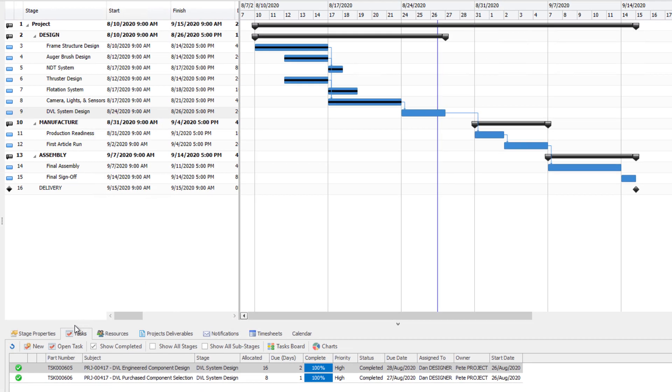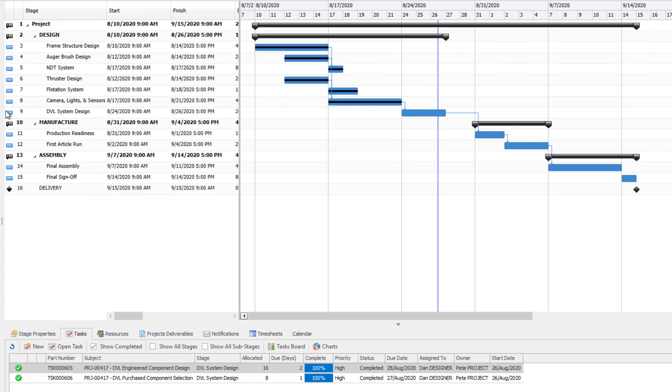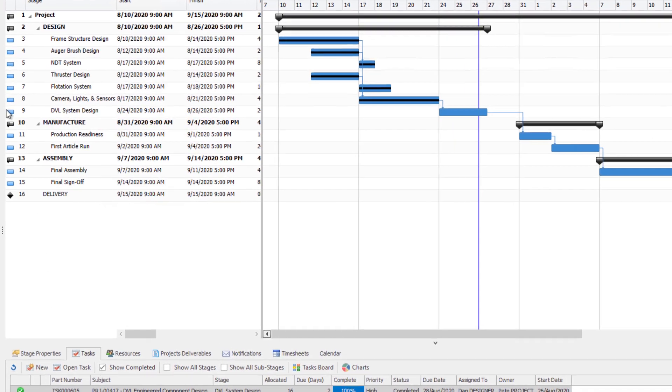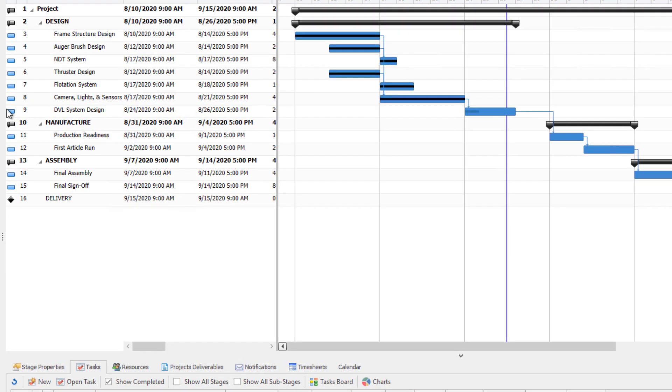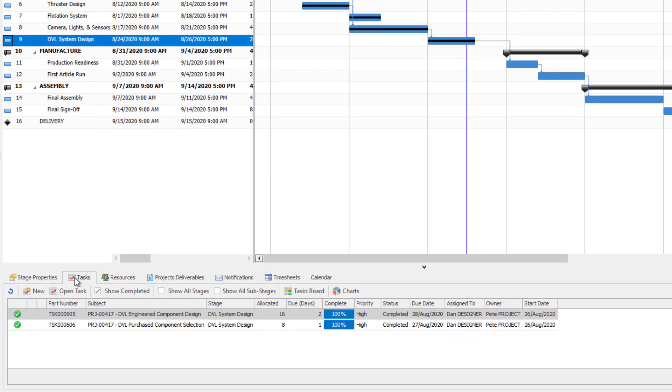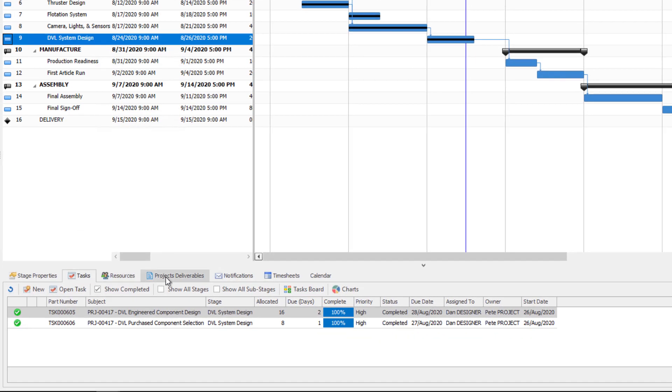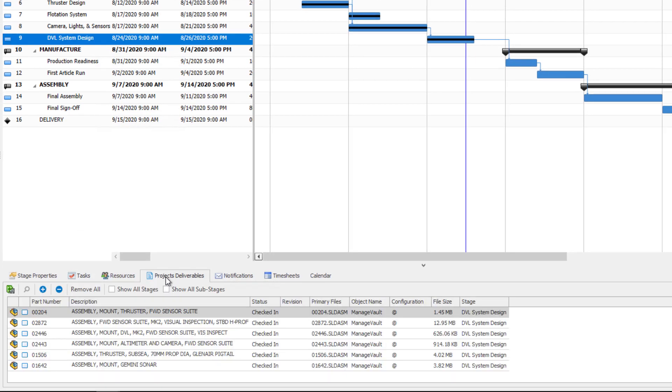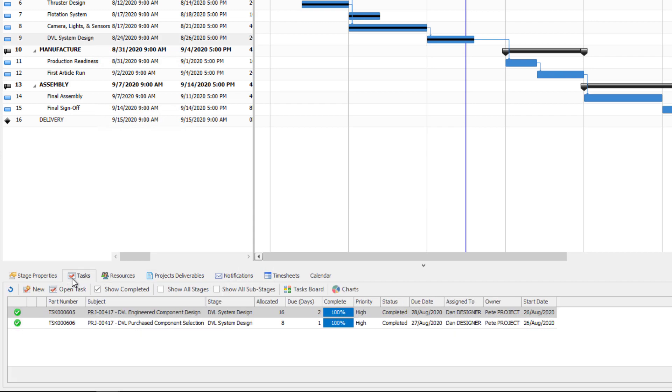New for Manage 2021 is the auto-update project service. This background service can be configured to check for task updates and automatically update the completion progress of project stages. Additionally, any attachments that have been added to the task can be automatically transferred to the deliverable section of the project.